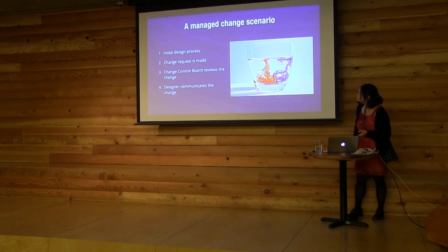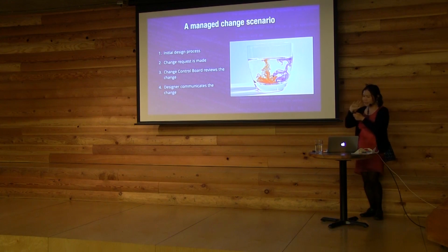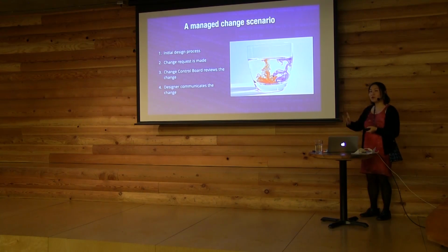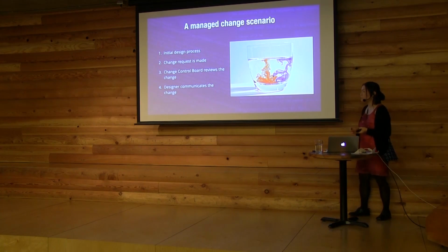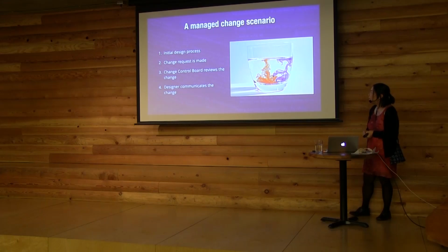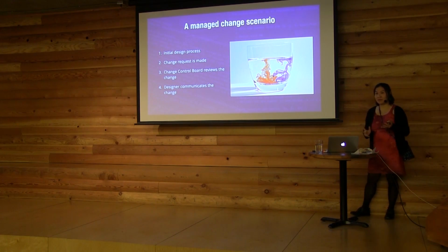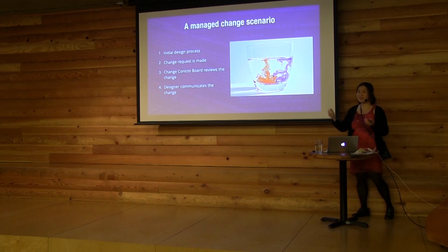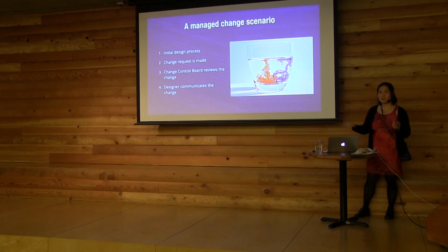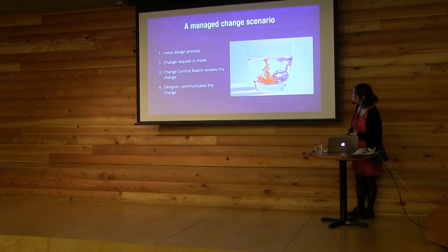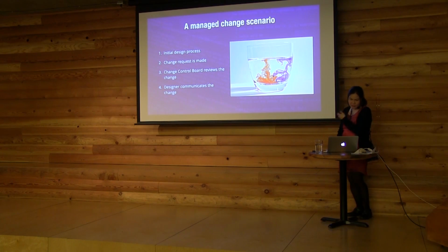So you're going to have some design process, and everybody looks at that, and at some point will say, okay, this is what we're building. Your design is accepted. It's going to be part of the user story. It's going to be built. And the next morning or so, somebody will find a problem with it. It could be the designer, but more often it's someone else that realizes that something's underspecified, something doesn't make sense, something's not feasible, something doesn't work for some reason or other. So a change request is going to be made, and let's go through it step by step.